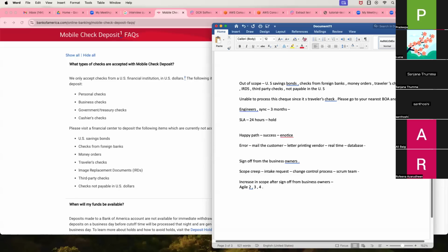But the problem is they don't give you accurate requirements, right? Because in 2 years, a lot of things can change. The market can change, the government can change, the mandate rules can change, laws can change, anything can change. For example, something like COVID hits, everything is going to change. So in that scenario, you have to go through the same change control process again.